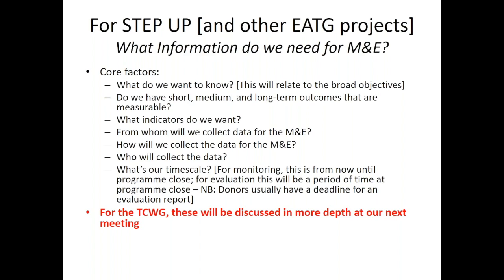So the timescale is important, and as I've mentioned already, the timescale for an M&E framework, what it sets up, is just as important as the work plan. So it should be built into the work plan right from the beginning, so that you're constantly collecting information that can be used for evaluation.